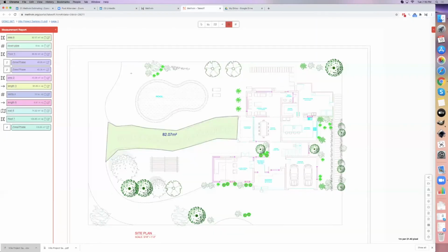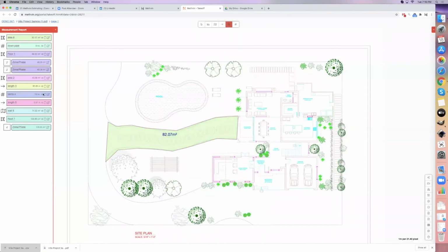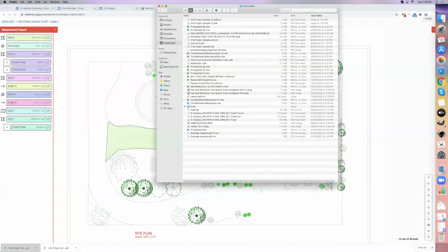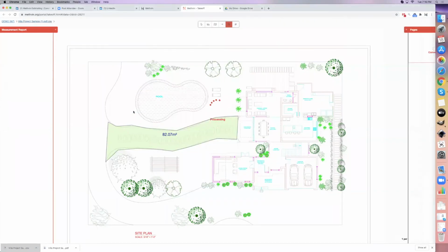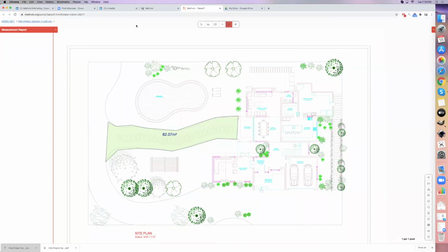Okie dokie. So this is the breadcrumbs. This takes you back to all your files you've got. I didn't show you that. So the best way this application works is for each trade, even if you have more than one trade on a drawing, I would upload that drawing twice for each separate trade, and then you can select the drawings. I'll quickly show you. You can just upload the same drawing a second time and just call it the new trade, or even give the same drawing name, or rename the drawing for the trade that you want to do the takeoff for.